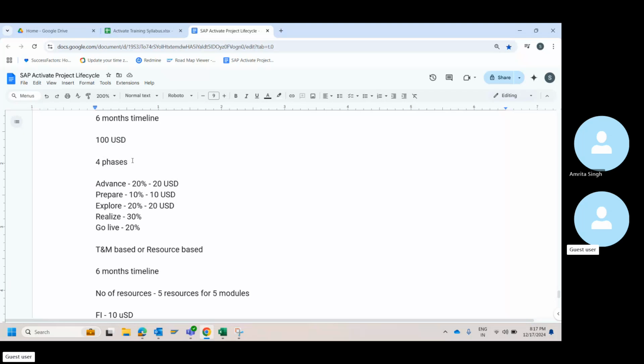What usually happens in a project is customers will have a penalty clause. Like I told you, SAP's investment is very huge. Again, it's going to be an objective and KRA for the management side, CXOs of that customer side, right? In that case, they will also have stricter timelines, which they will give in the contract itself, and many times they will have penalty clauses. So they will say, for every delay that is happening in the project, I will charge you 2% or 3% of the total value of that phase. Something like that. There will be a penalty clause. So it goes both ways.